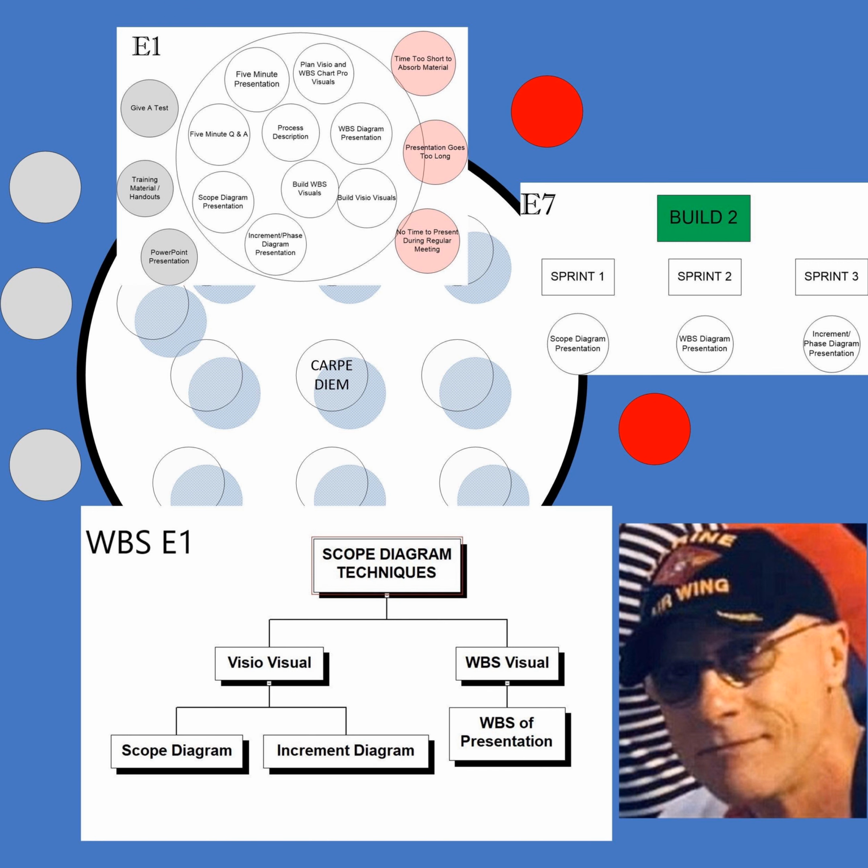I haven't showed you this yet, but don't forget this part of it. When you do the scope diagram, you also do a table, either in Excel or in Word, whatever you prefer, and you number all the bubbles once you're done. Number all the bubbles in the scope diagram and also those out of scope, and define them on that list. The first column will be the number. The second column will be the narrative that you actually have in the bubble. The third column is a description, a definition of what that means to everybody. And everybody reads that and agrees on it, and you're all on the same page.